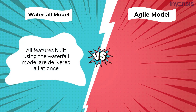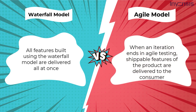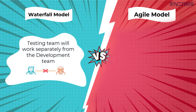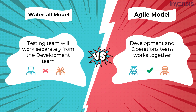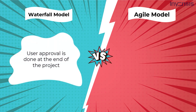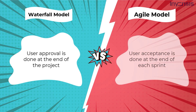Following the lengthy implementation process, all features built using the Waterfall model are delivered all at once. When an iteration ends in Agile, shippable features of the product are delivered to the consumer, and new features are available for use immediately after shipment. In the Waterfall model, the testing team works separately from the development team, whereas in the Agile model both teams work together. User approval is done at the end of the project in Waterfall, and at the end of each sprint in Agile. Both require user approval before going to the production server.